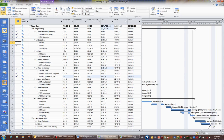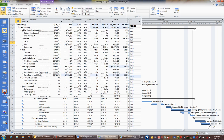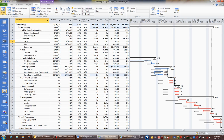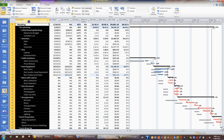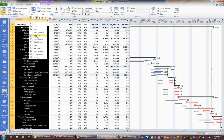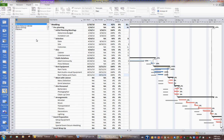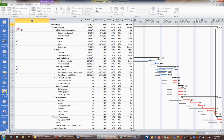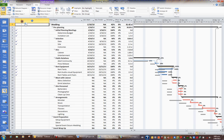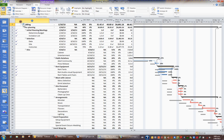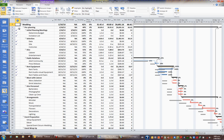I'll go back to the Tracking Gantt. I notice I don't have an Indicators column in my Tracking Gantt. So what I might do is right-click Task Name, Insert Column, and ask for the Indicators column by pressing I and clicking Indicators. I can then resize it. And this is quite useful to easily see those tasks that are completed with the use of a tick.